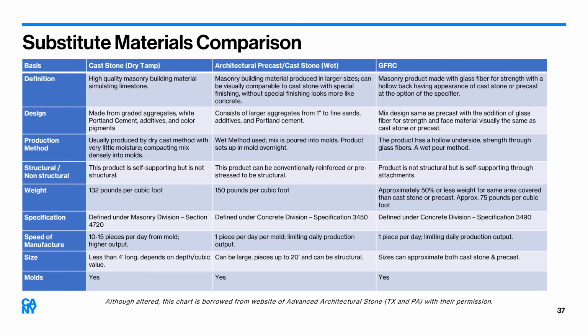I'm a preservationist, and on landmarks and on buildings of historical significance and buildings in historic districts, I will go to the mat for replacement in kind in terracotta. However, we have to be responsive to our clients, and there are other kinds of buildings. There are other buildings that have different historic significance, different detailing, and some of those clients, owners, they can't wait 12 months to get real architectural terracotta from Boston Valley or Gladding McVean, or even the 5 months that Darwin is quoting now. So although there are 3 really good options, it's not always a possibility.